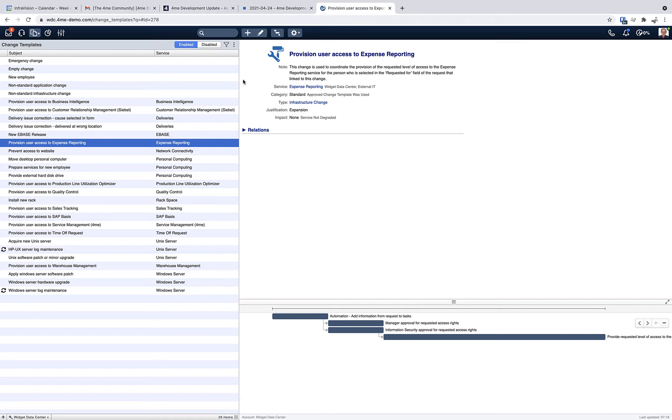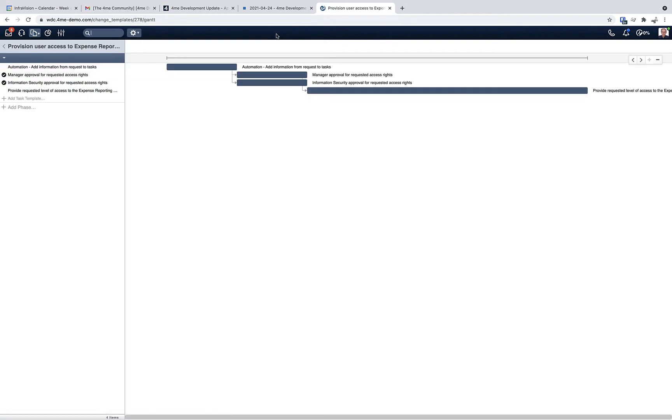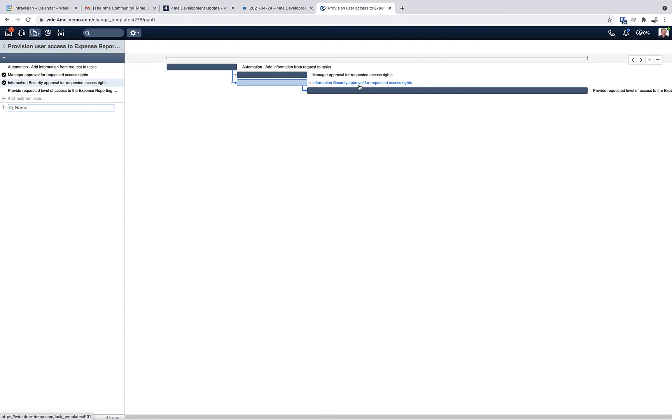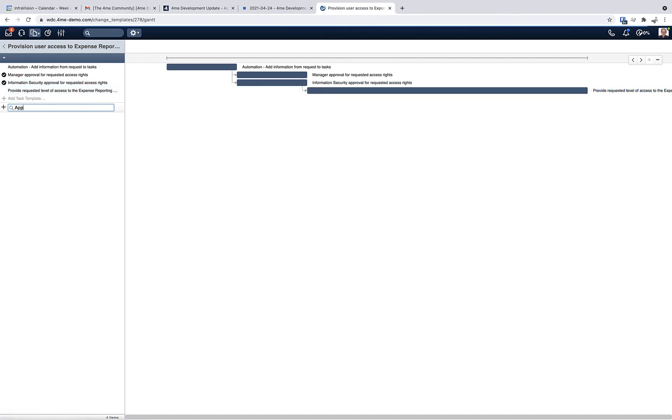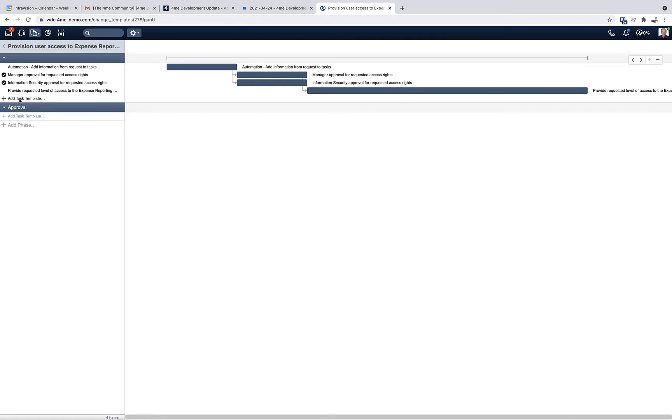When we open this change template in the Gantt view, we can add two phases. Let's say there's an approval phase and a registration phase where the requested access is actually provided. So let's add two of them: the first one is approval and the second one is registration.